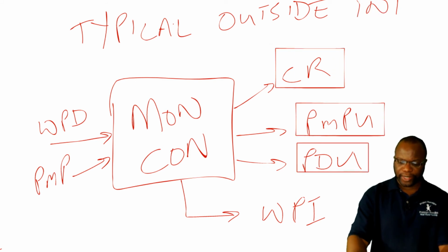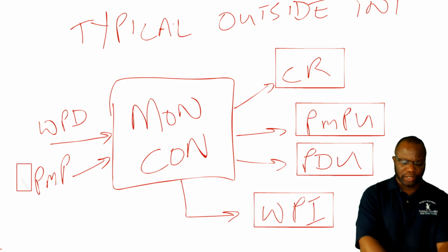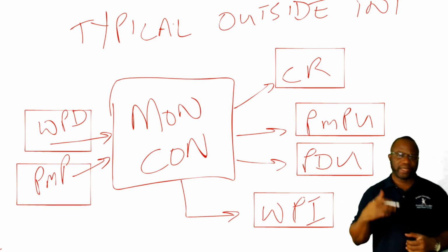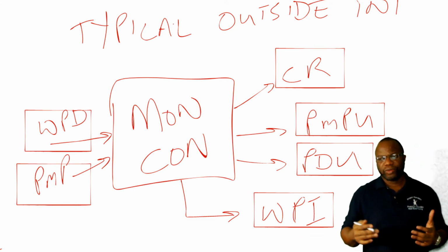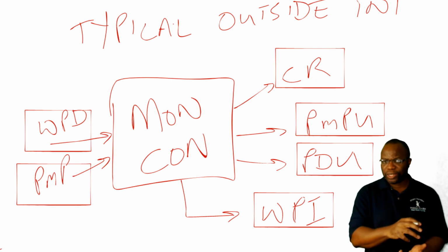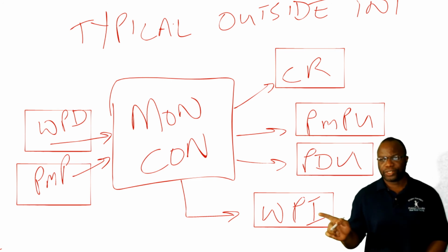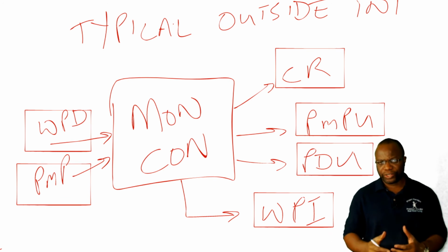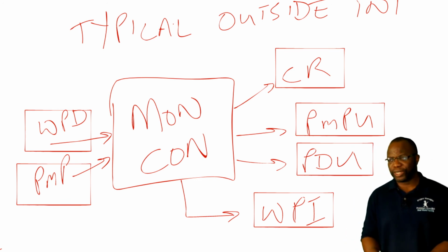All right, take a look at how all of these little pieces are either going into the process or coming out of the process, and use this understanding, because when you're monitoring and controlling the project, you want to monitor and control it from all of the knowledge areas. Okay, and you can see over there we got work performance data going in, but we have WPI coming out, because we want to analyze the work performance data from the angle, from the perspective, of that knowledge area.